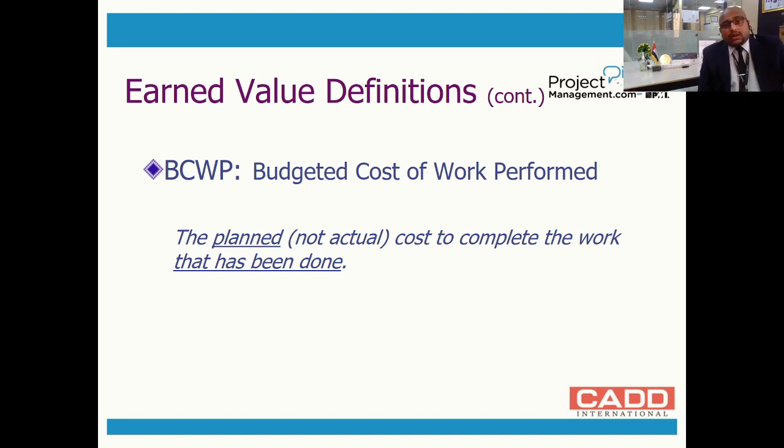Here is a simple example. I went to a supermarket to purchase a laptop. My amount was around 4,000 dirhams for this laptop. This is my plan. But when I purchased it, it cost me 4,100. So 4,100 is the actual amount, 4,000 is the planned amount, and the earned amount is again 4,000 itself, because 100 dirhams was paid extra.